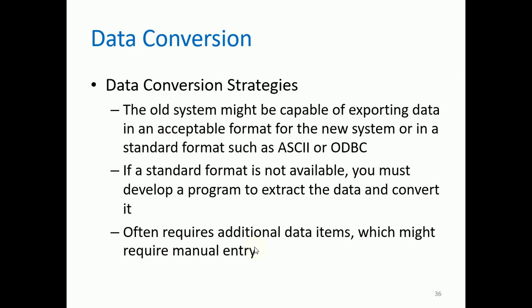Okay, after the training we have the data conversion. So we have these data conversion strategies. The old system might be capable of exporting data in an acceptable format for the new system or in a standard format such as ASCII or ODBC. If a standard format is not available, you must develop a program to extract the data and convert it, and then it often requires additional data items which might require manual entry.